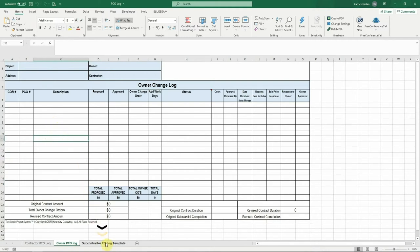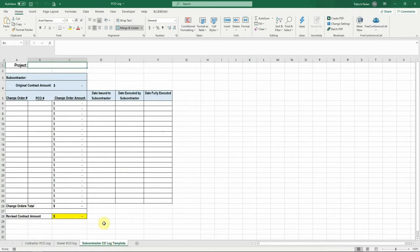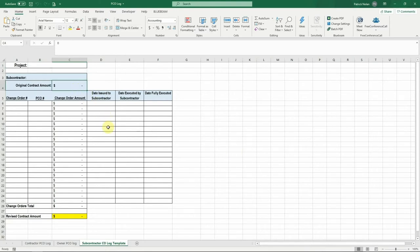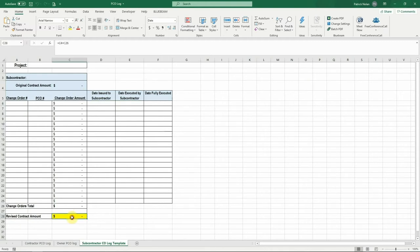The third tab is a subcontractor change order log. This log will be used to track the change orders you're issuing to each subcontractor. This log allows you to see the subcontractor total contract values plus their approved change orders, dates of execution, and updated contract amount.